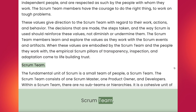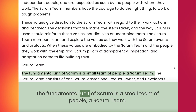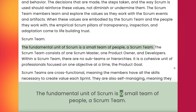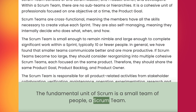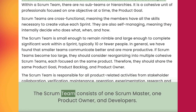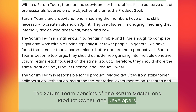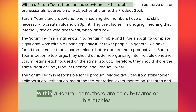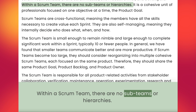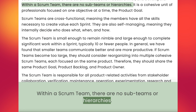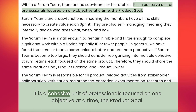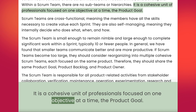Scrum Team. The fundamental unit of Scrum is a small team of people, a Scrum team. The Scrum team consists of one Scrum Master, one product owner, and developers. Within a Scrum team, there are no sub-teams or hierarchies. It is a cohesive unit of professionals focused on one objective at a time, the product goal.